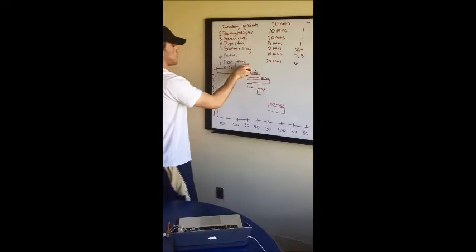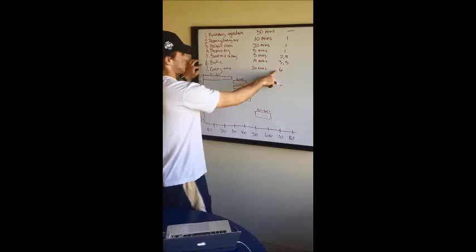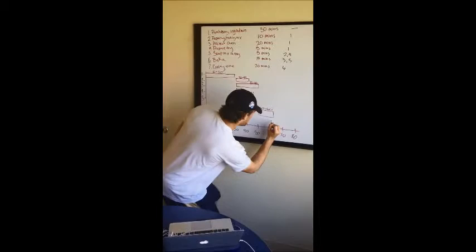And so once those brownies are completely done, we need cooling time. And the only thing that that follows is once the brownies are completely made. So that's step six and that's 60. And if that takes 20 minutes, it starts at 60 and ends at 80.